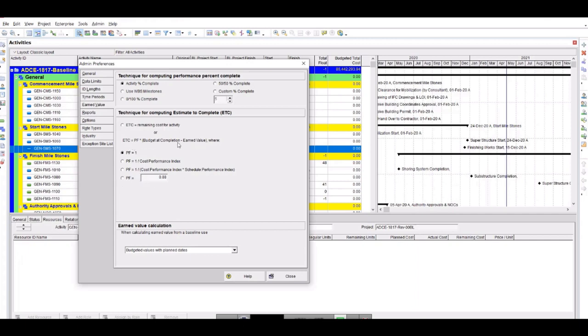So what is this condition? This is telling me the budgeted completion: the budget of a project, program, portfolio, WBS level, cost account level, control point level, any task, the budget of that entity minus the earned value. Earned value here is represented as the amount of scope you have finished. So we will always discuss earned value as a scope completion. So the budget of the project, or you can say the total scope of the project, minus the completed scope of the project will give me the remaining scope.